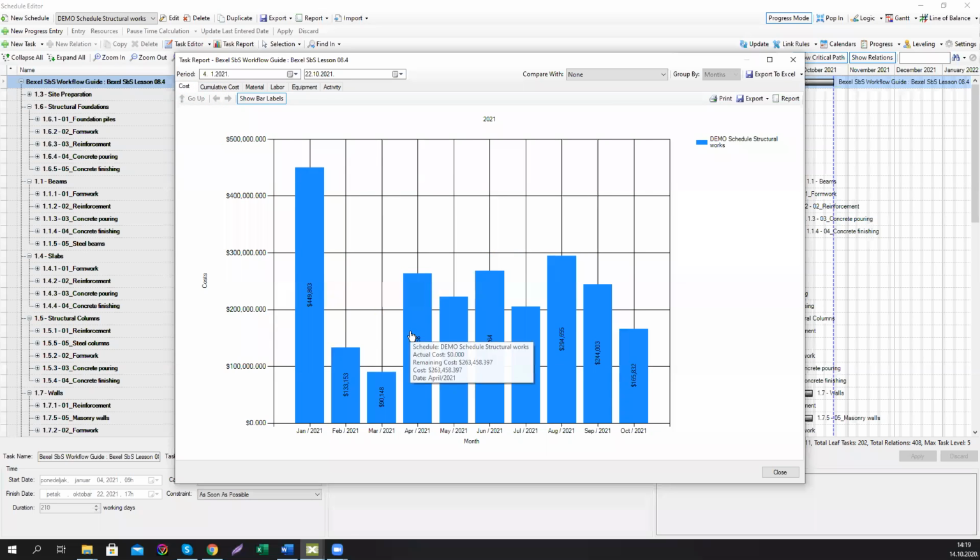And here with the cost, you see some discrepancies. You see that you are spending way too much money at the beginning of the project than it should be. So this part is pretty much leveled, but at the beginning you have a certain activity that takes way too much money, and at the same time probably even resources, even though in this schedule we don't have resources included.